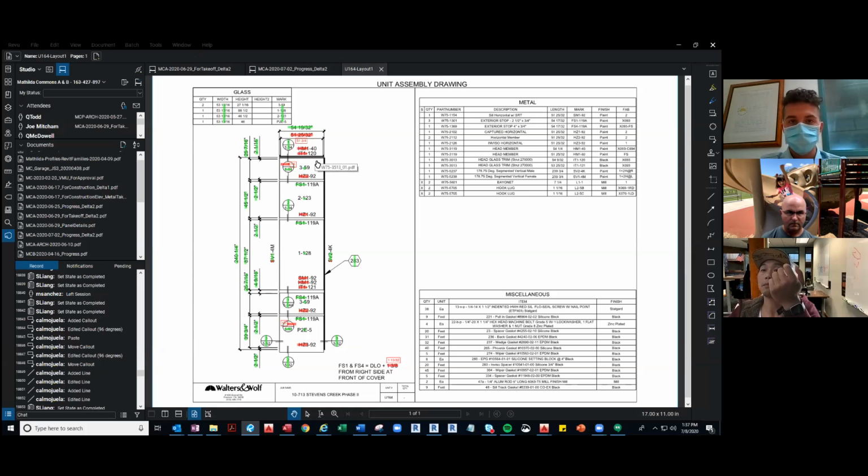And then it'll go back to the project engineer, and they will do the update per the check, as you know. So the PC is really just the QC check. And then once they update, they go through the release process to release to the shop under their name. So we make these things called shop work orders, for the shop to look at and scan their time when they're doing the actual fabrication.